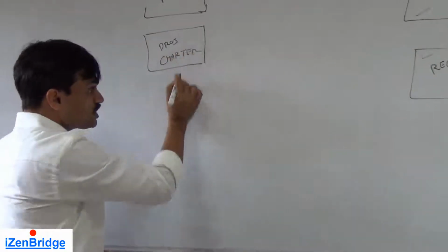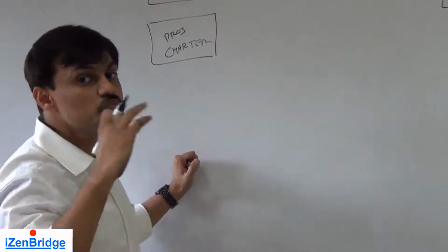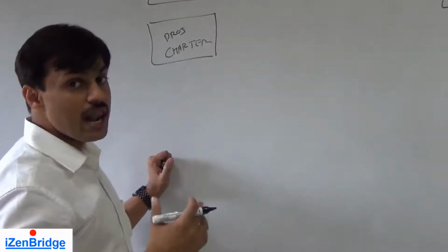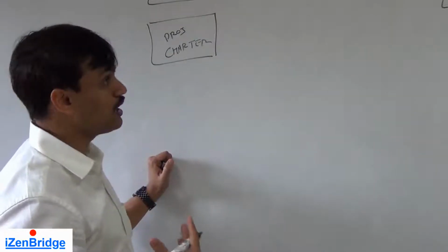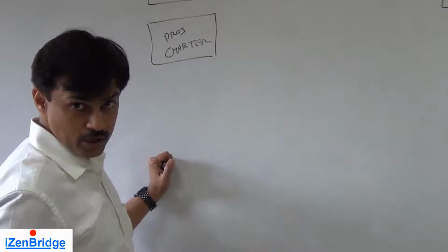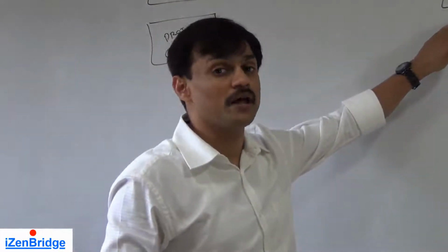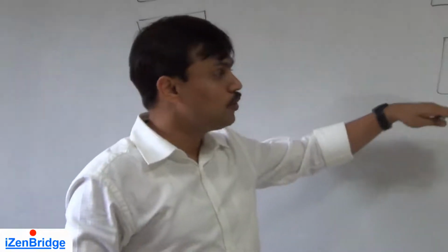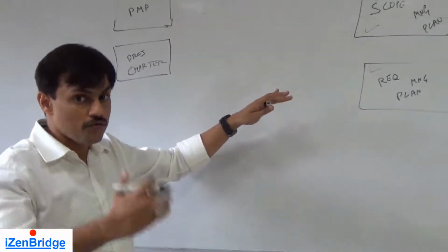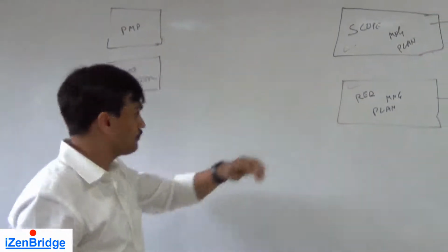Why? Because project charter communicates expectation of end users and sponsors from this project. And it also communicates a level of rigor or level of control needed for managing the scope. If you want to change the scope, how are you going to change it? That process is written in a scope management plan. And this change process is integrated with perform integrated change control, but the trigger, the initial steps are written here.